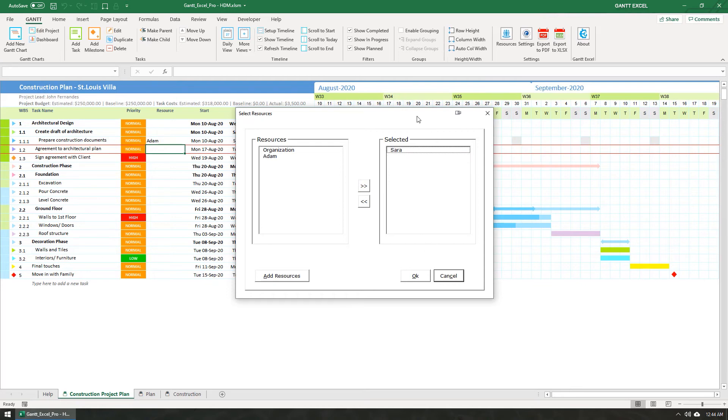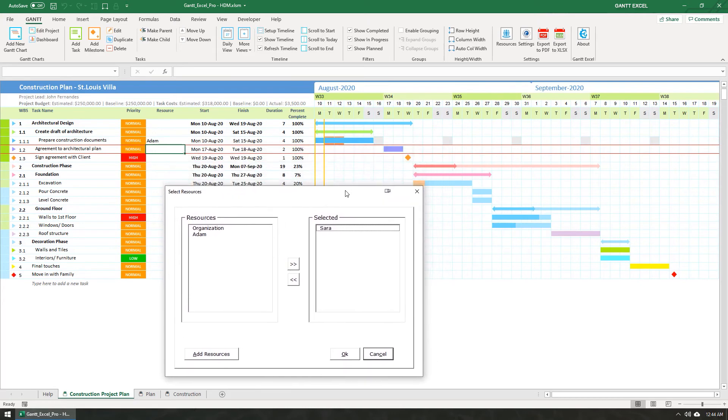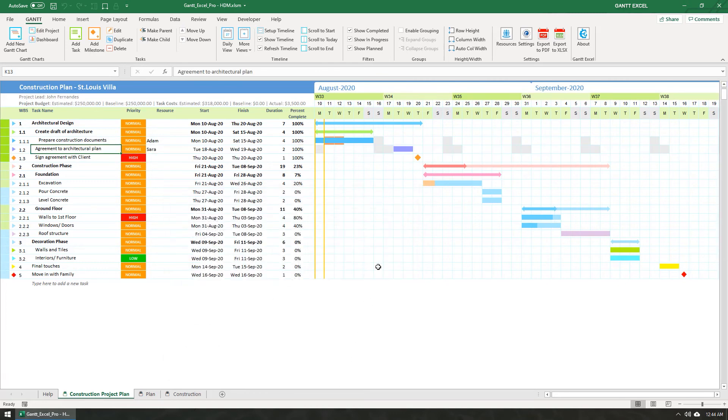Now before I click the OK button, please observe that this task starts on Monday. I'm going to click the OK button to assign this task to Sarah. You will now see that this task which was going to start on Monday has moved to Tuesday as Sarah does not work on Mondays.